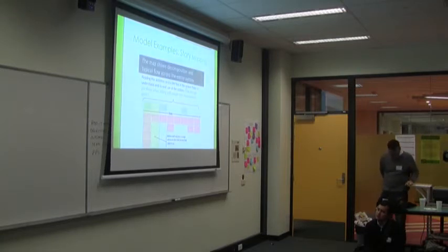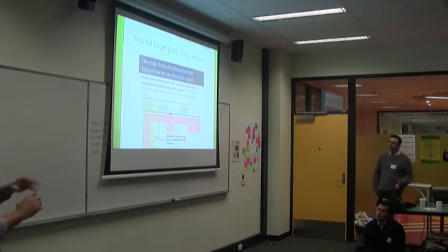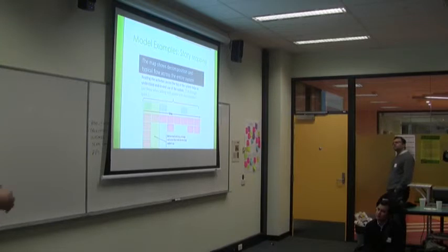Okay, so story mapping. We talked about process mapping, and we talked about personas, and they're two key things that will help you doing story mapping. I believe we've already had a great presentation about story mapping, so I'm not going to talk about this too much. One thing I like about story mapping compared to my normal backlog is that with the backlog, as soon as the product owner or whoever reprioritizes it, I lose sight of what the big picture looks like. The story map maps out your process, talks about key points within that, and puts it on a wall in a logical flow.